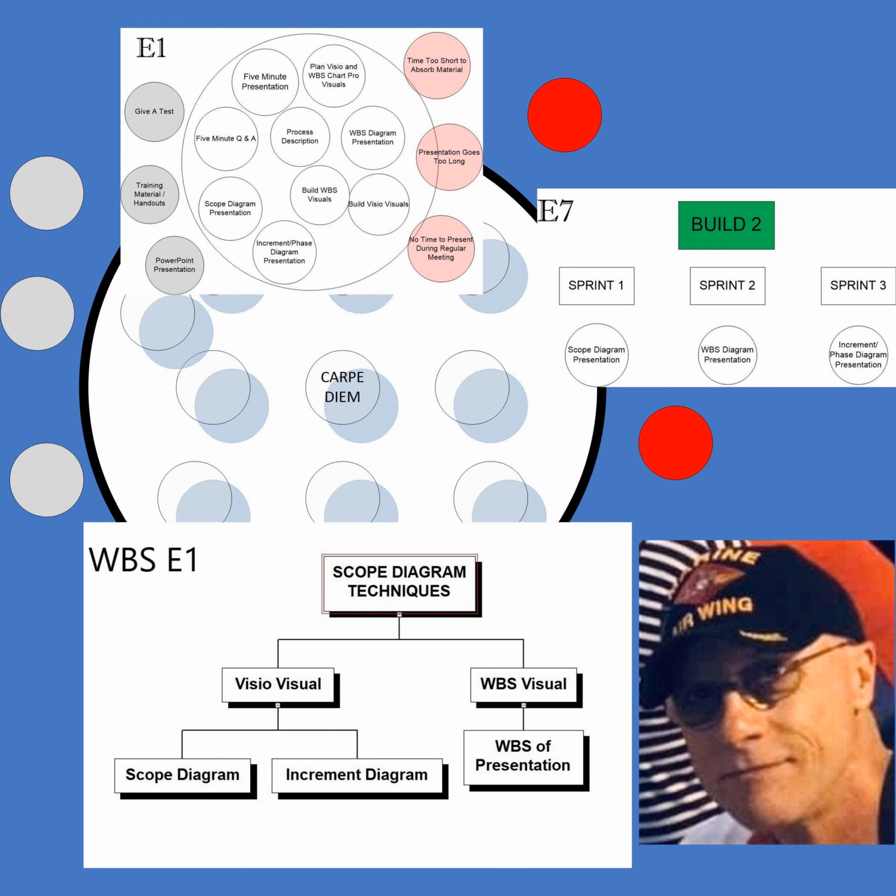But you should know whether or not it's part of the scope even before you get there. Because if the meetings are different, if these are different people, if it's not the same thing you're doing. Remember I discussed that, for the data center project, you were physically moving equipment. And that one application was actually not moving. They were shutting it down there, decommissioning, get rid of the equipment. They were buying new servers to set up at one of the two locations you were moving to. So that's not part of your project. That's not a physical move. It's a whole different thing. So that, when you see in E3, those are the bubbles that left. And I think someplace in the work breakdown structure I showed you those as well last week.